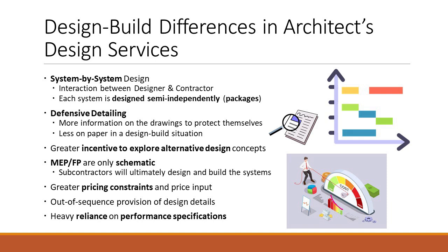If it's design-build, well, the designer is talking to the contractor. They're the same company, so they don't have to do this defensive detailing. So even the work that the designer does on paper is less in design-build than you're going to see in the traditional. Now that can be problems later on if something goes wrong with the building and they don't have all the detailing in the drawings.